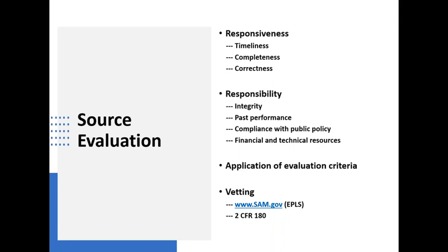And now that we've got substantial digital activity in all of our lives, checking on some of these things with access to the internet is a lot easier than it used to be. So, for example, checking their corporate status with the state Secretary of State, where they're incorporated, or the Attorney General's office to see if there are any pending judgments, with the State Department of Revenue to see if they're up to date on taxes.